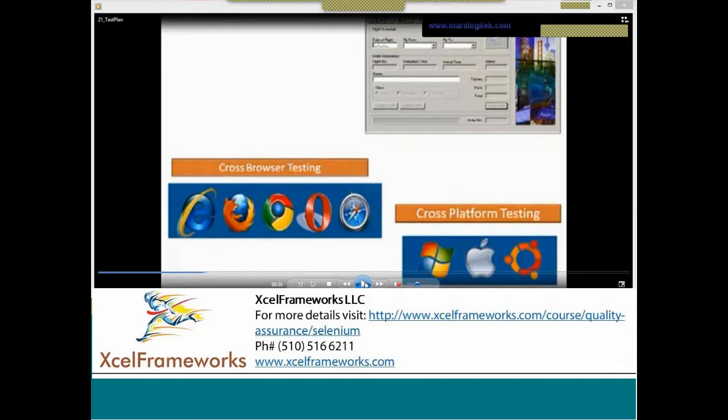The exit criteria is that all 10 tickets already communicated to QA should be working perfectly. And for the new feature, at least the basic feature should be usable. We understand sometimes with a new feature you come up with 100 test cases, and let's say all positive validation is working and still we see a couple of issues. When I say a couple of issues, probably P3 issues. I'll come back to priority 3, how to define these priority bugs. That will be covered in a bug tracking tool. So it's something like what are the P3 issues or P2 issues or high priority or critical bugs. If that is there, we cannot release.